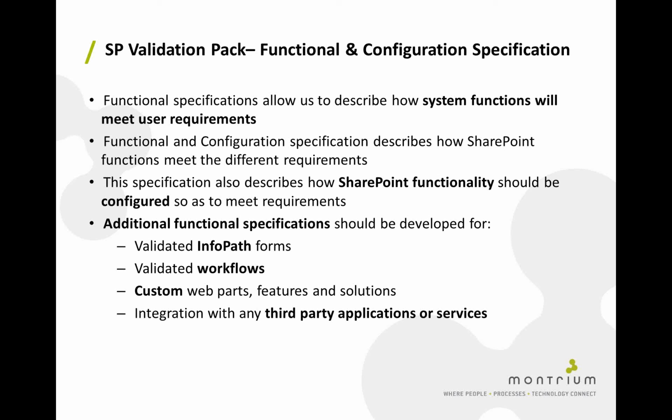We may need additional functional specifications if we're going to be deploying validated InfoPath forms, validated workflows, any custom web parts, features or solutions, or any integration with any third-party applications or services that we might put in place. So these would all require their own specifications in addition to the baseline SharePoint functional and configuration specification.